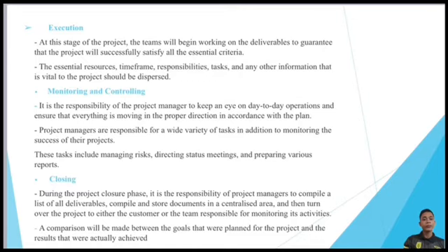Closing. During the project close phase, it is the responsibility of project managers to compile a list of deliverables, compile and store documents in a centralized area, and then turn over the project to either the customer or the team responsible for monitoring its activities. A comparison will be made between the goals that we planned for the project and the result that we actually achieved.